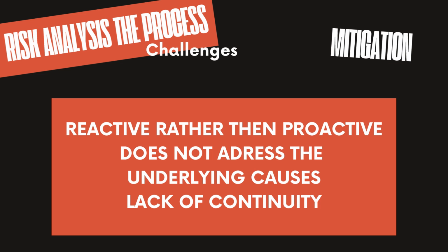Another hallmark of naive risk mitigation is the failure to monitor risks continuously. Often risks are identified and mitigated at the beginning of a project, and then everyone moves on. But risks evolve. For example, a risk that seemed low at the start of a project could escalate as conditions change, such as new competitors entering the market or shifts in political regulations. In a naive approach, you won't catch these changes because you've already checked off the risk and moved on. A more effective strategy involves regularly revisiting and reassessing risks throughout the project lifecycle.